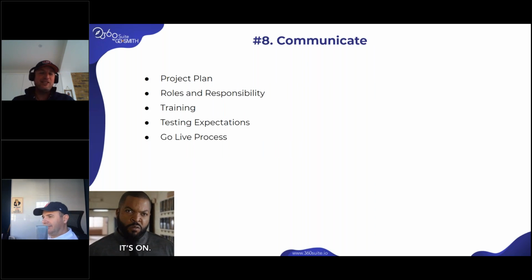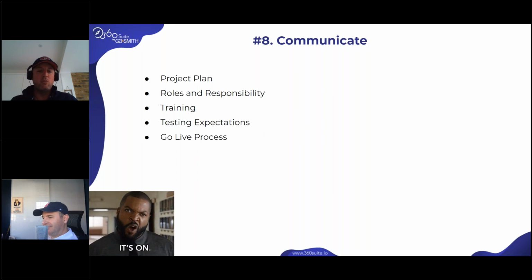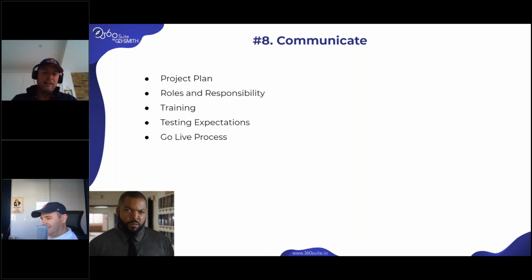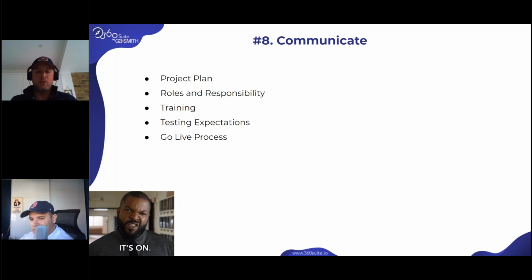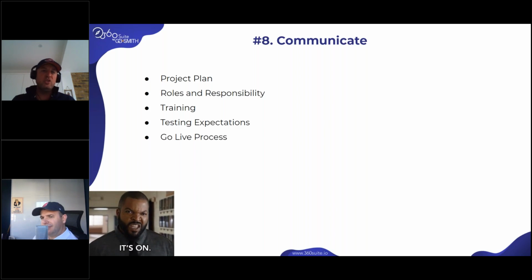Okay, now it's on. Now, the reason why I've chosen this one is I have seen many companies working in the shadows with external consultants doing all the work, and they send an email on Friday to say, oh, by the way, Monday morning, it will be this new version, without any communication. And it's ridiculous. You might have a department where it's the end of the quarter. It's the worst time for them. Or somebody just created some new stuff on Friday, which will not be there on Monday because the cutoff was at whatever time it was. So communicate your project plan, communicate the rules, train your users. I have a slide about training just next.